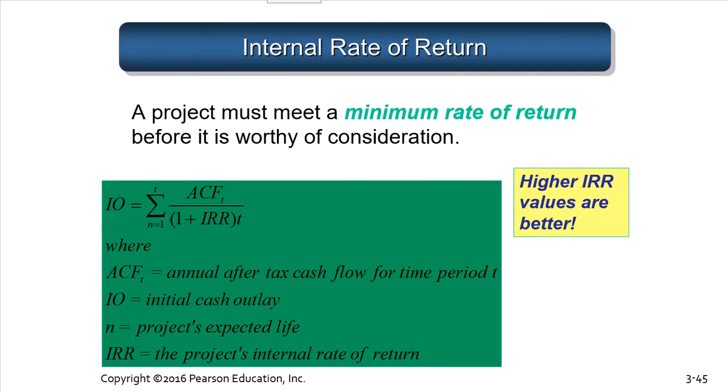This formula tells you the following. Unlike the NPV, which will give you a positive number, a 0 number, or a negative number. Positive means good. 0 means maybe. Negative means don't do it. And you're really comparing your project to a safe investment. The IRR, or the internal rate of return, tells you something different. It says, what is the effective return rate overall? Ignoring what return rates I could get on the market today,